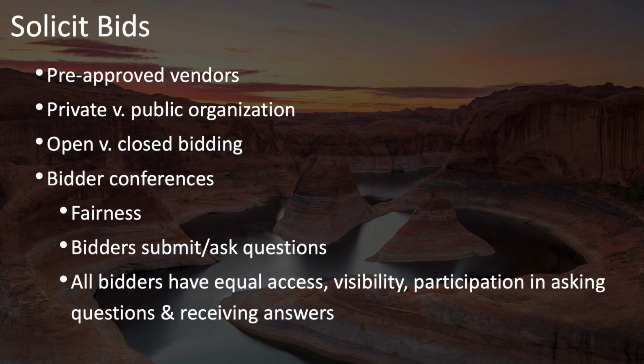In addition, often a bidder conference will include some upfront questions that are submitted ahead of time. That way those questions can be distributed amongst all of the bidders prior to the conference or at the beginning of the conference. And that gives you an opportunity to make sure you have answers to all of those questions before you start the conference.